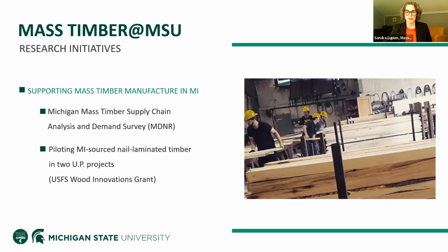The reason for this is that nail laminated timber is a type of mass timber that doesn't require adhesive. It doesn't require a hydraulic press. It doesn't require a large brick and mortar, that's mass timber humor, factory to make it in. So it doesn't require that huge upfront capital investment that a factory requires. Instead, you can make nail laminated timber panels on the construction site or in a simple warehouse near the construction site, using just small teams of people and basically nail guns to nail it together, using a design that's been created and signed off on by a structural engineer.